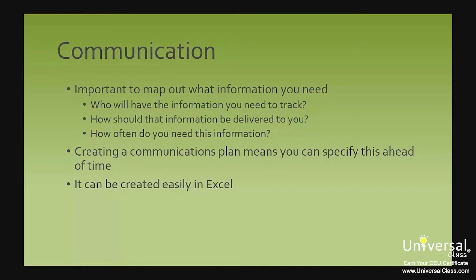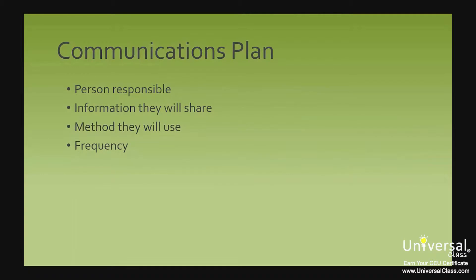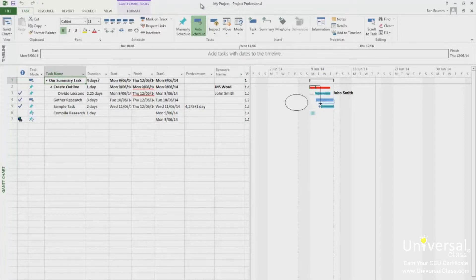By creating a communications plan, you can specify ahead of time what information you need, who will deliver it to you, and how often. You can create a communications plan easily using Excel. It should include the person responsible for communicating information to you, the information they will share, the method they will use such as email, report, or meeting, and the frequency such as daily, weekly, or bi-weekly. Key stakeholders within the project should communicate progress to you regularly.